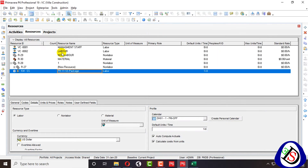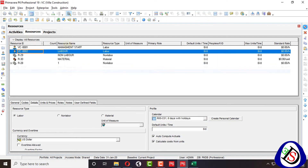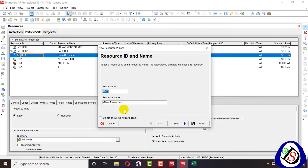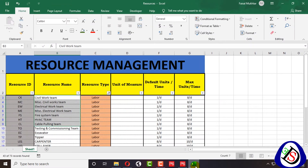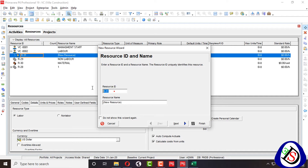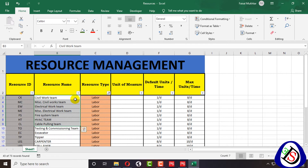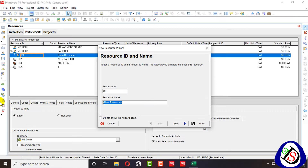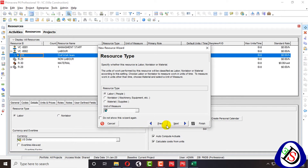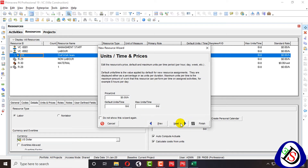I click the add button and add my first resource. The resource number is CK, and the other is civil work team. I copy civil work team here and click next. This one is labor — people.